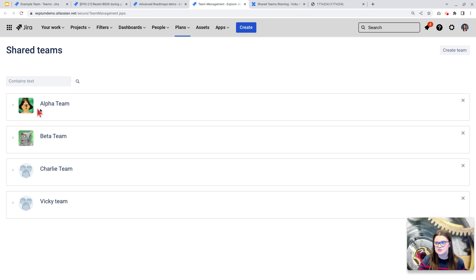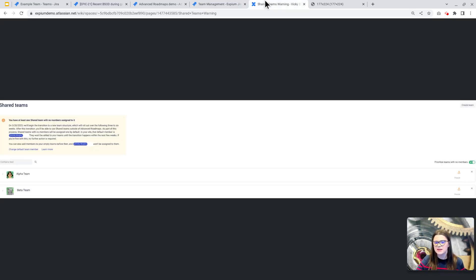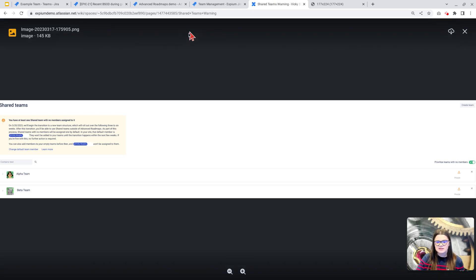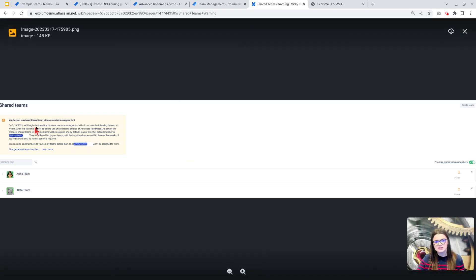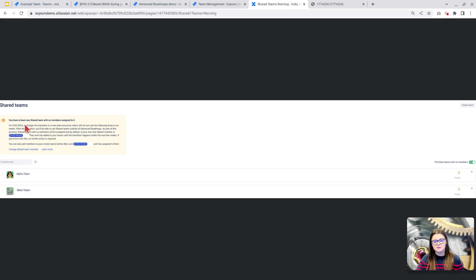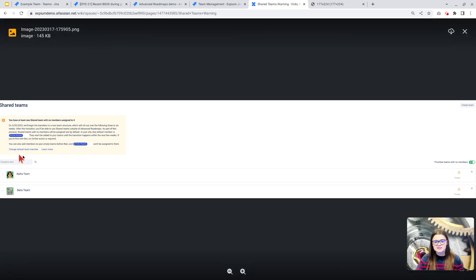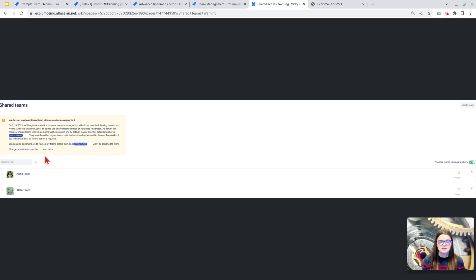I'm actually starting to see a warning that looks something a bit like this in some of our customer instances. It is just calling out that a default team member will be added to any of those teams starting on March 20th, 2023. I also see that there is a button to change that default team member if you need to.